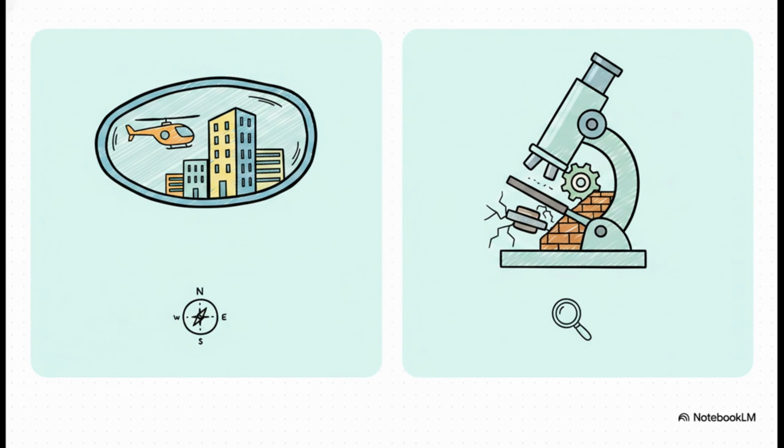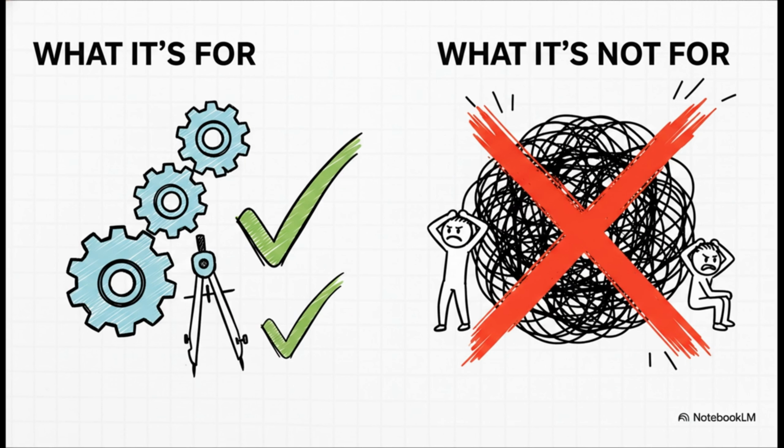While it's often non-binding, it gives the parties a crystal-clear standard based entirely on specialist knowledge. It's super important to see the difference here. You have the broad, 30,000-foot commercial reality check of advisory ADR, where senior execs are looking at the big-picture risk, compared to the microscopic, deeply technical focus of determinative ADR, where a true industry expert gets right down into the weeds of measurement issues or technical defects. The crucial takeaway is that expert determination is strictly for single-issue technical problems or narrow valuation questions. Dr. Rao gives the team a massive warning here. Do not use this for resolving complex, multi-issue relationship breakdowns. It demands way more from the process than it's actually equipped to handle.